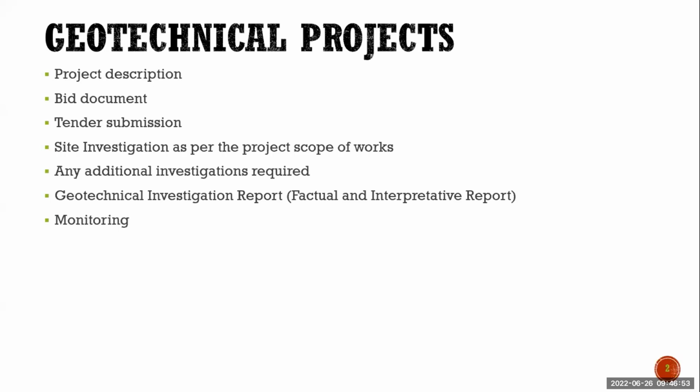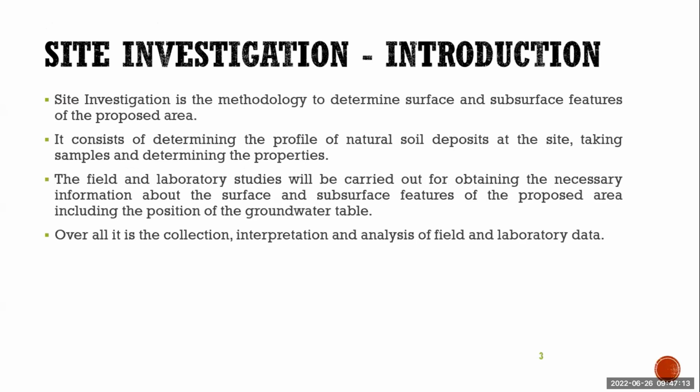So overall, this is how a geotechnical project starts and ends. It starts with a well-defined project description, then the bid document and the tender submission, then site investigation, then the geotechnical report and monitoring. So this is the overall view for your understanding. Now let's start with the site investigation.